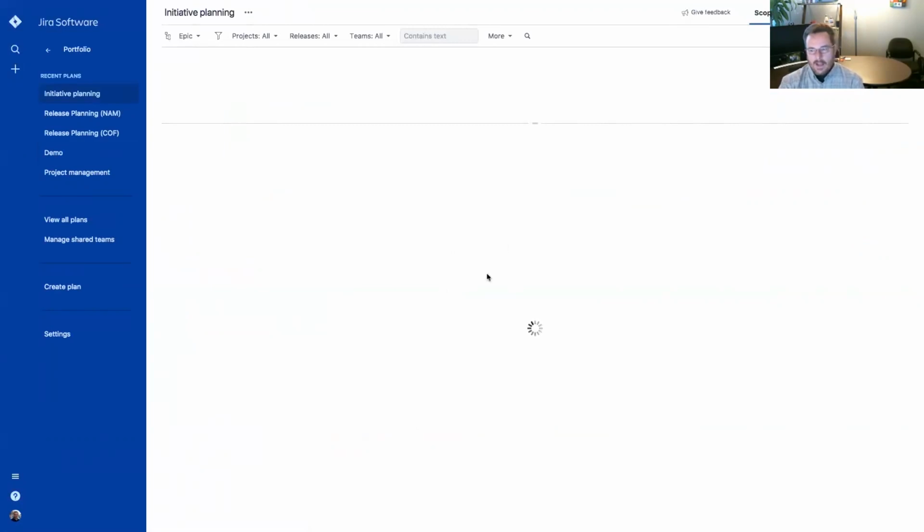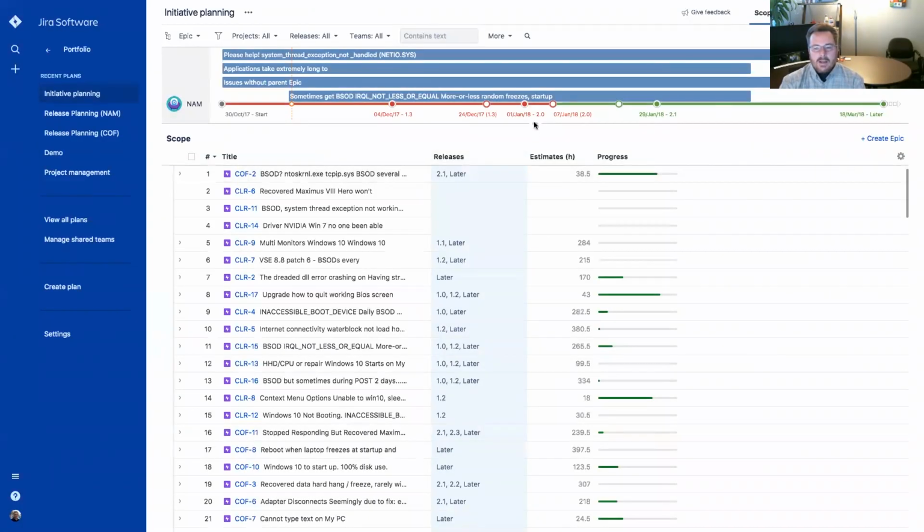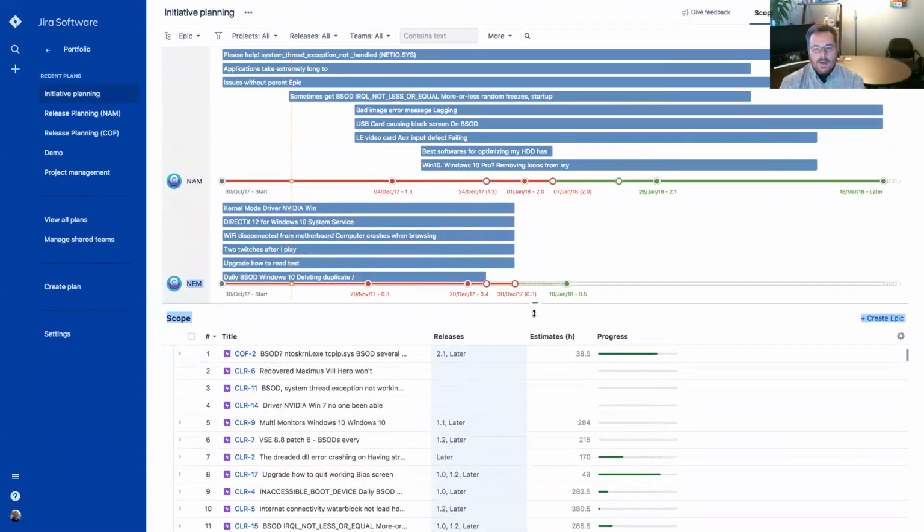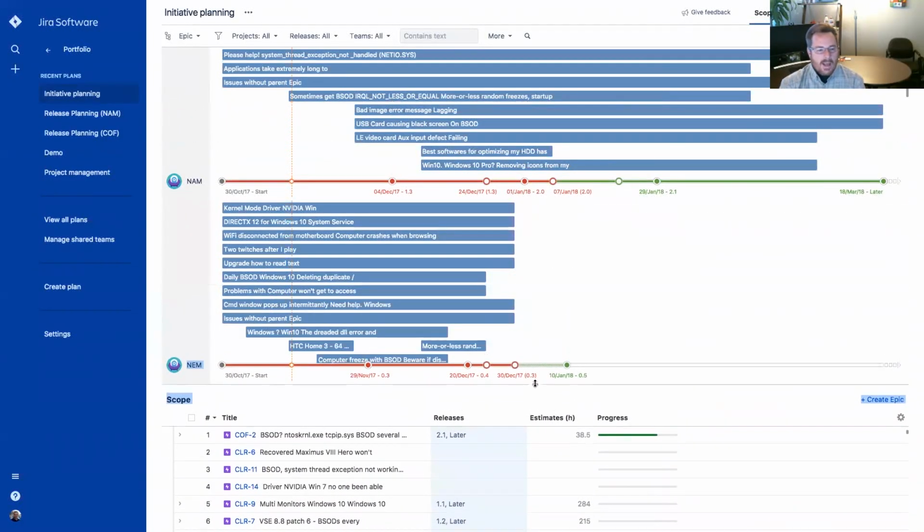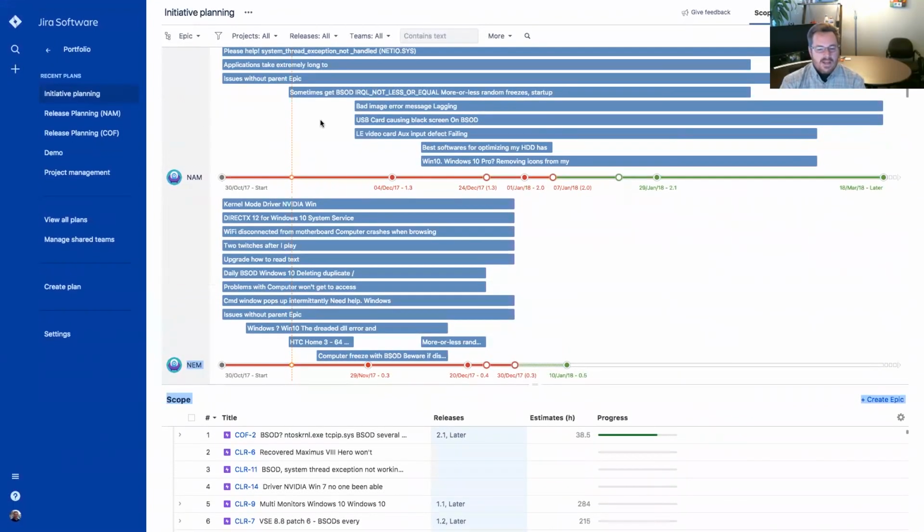Now, I'll have created for Thursday the actual initiative issue type, but the idea here is that you've got a master set of major issues, and you can see the projects that they represent, and you can see a summary view. This gets really important when you're reporting up through a PMO to a C-suite or a set of management that really only care about the high level. They don't want to see the detail.